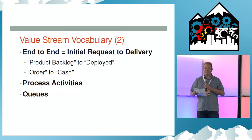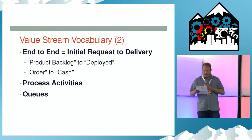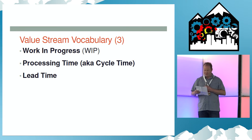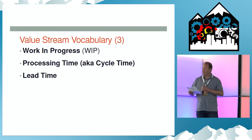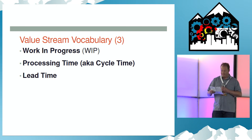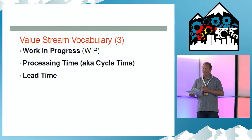Next are process activities, which are like high-level flowchart items. Queues are the items waiting for work to be done — these are regarded as non-value add time. Work in progress are items in the queue waiting for things to be worked on, while processing time is the value add time, something that the customer would actually pay us for doing. Lead time is the total process time plus the non-value add time like waiting in queues.